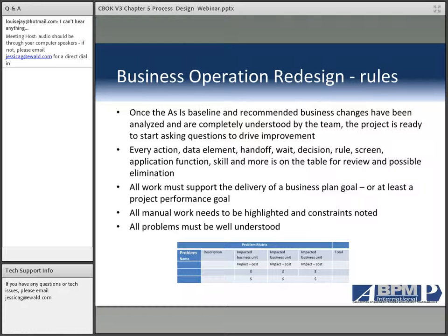And from my perspective, all of the goals in the project have to be measurable. If it's not measurable, you're never going to know whether you've accomplished it or not. So to the degree possible, I would suggest you work with the business managers and then IT, people who are in your Lean Six Sigma group, a variety of those people to come together and say, here are the goals. How are we going to measure them? What data do we need to measure them? Where are we going to get that data, and how do we pull that forward? And that becomes a critical component of looking at how you are going to move forward and how you're then going to justify success at the end of the project.